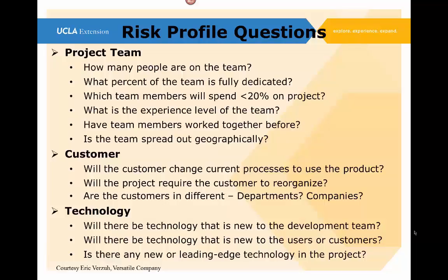Another category, technology. Is this technology new to the development team? Or is it going to be new to the users or customers? That's when we get into the discussions of technology transfer and training and things of that nature. Is there any new or leading edge technology? In aerospace companies, when they have projects for the government, there's normally a lot of leading edge technology, new technology, and that means there's a lot of unknowns and a lot of uncertainty about how well the technology is going to be able to reduce to practice and be applied in whatever the deliverable is for that project,